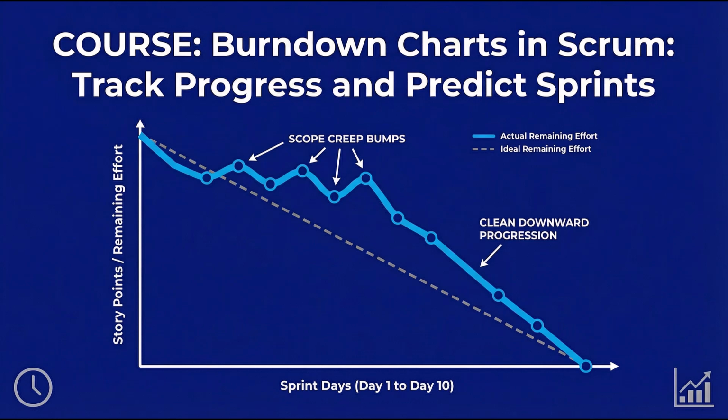Actions taken. Established sprint protection rule. Any addition requires equal removal. Created a fast-track process for true emergencies, used only twice in 6 months. Weekly backlog refinement to prioritize upcoming production issues.